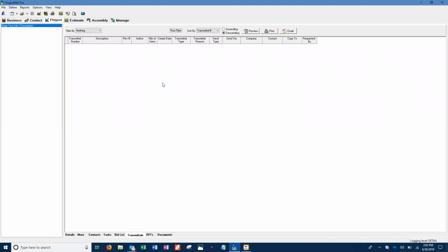A lot of times an RFI could turn into a change order down the road. Like you might ask them a question. Let's say they tell you one color. The color's been discontinued. You reach out to them with an RFI, and they come back and say, yeah, I use this color, which is also a Wilson art.